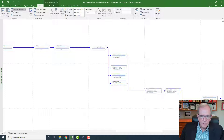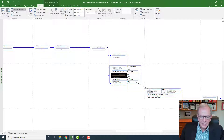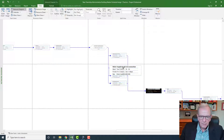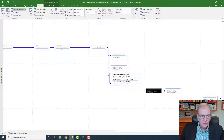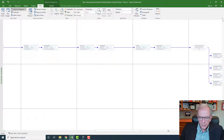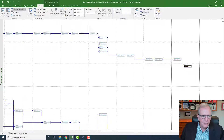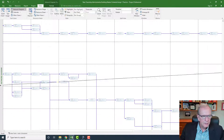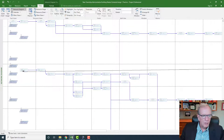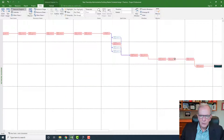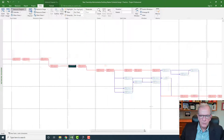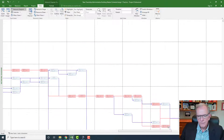That's exactly why I like to check in multiple views — it's very easy to miss open ends. For example, install perimeter rigid insulation and water supply rough-in and gas roughing connection need to be connected. I can just grab the task with my left mouse button, pull it to where it needs to go, and let go. And I can do the same for the framing one. Now those open ends are fixed right on this screen.